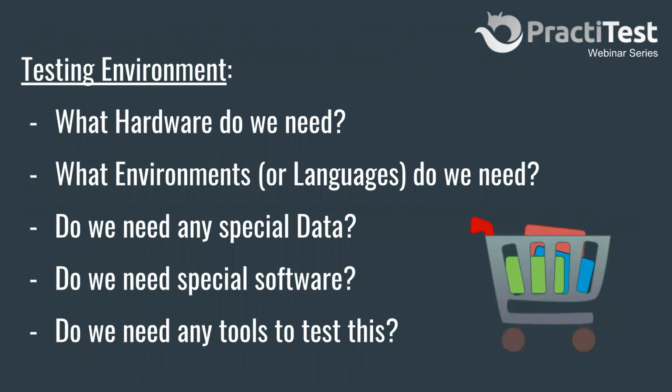There are additional questions you can ask yourselves regarding the testing environment, and you do want to understand if you have the correct environment, or if you need to build it. And remember, getting the correct testing environment is, A, time-consuming, B, expensive. If you have something that will require funds, you need to get them at the beginning of the project. You will not get them at the end of the project.